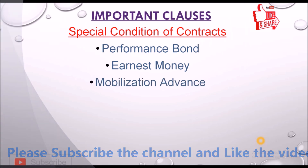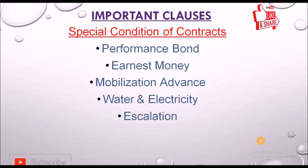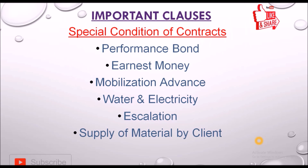Next is mobilization advance — an advance given to the contractor based on the value of the project. Next is water and electricity — whether the client will provide these free of cost or the contractor will arrange them. Next is escalation-free contract and supply of material by the client — what materials are supplied by the client and what wastage consideration is mentioned in this clause.